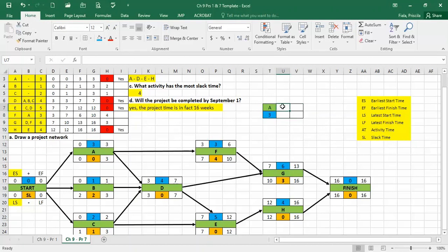And the way they do it is, well, we know they start at 0, correct? So we're going to start at 0. So over here equals 0 plus the activity time, which is 3. And when you come back, you should figure that here would be 3. Let's just suppose we did all the calculations, and you could do equals 3 minus the activity time, and you're going to get 0. So the way they arrange it is completely different than what I do. I prefer mine because I keep everything, I can even see this time I included. Your book does it differently. If you want to calculate the slack time, then you really just have to do equals the latest minus the earliest. That's your slack time. Okay, so whatever works for you.